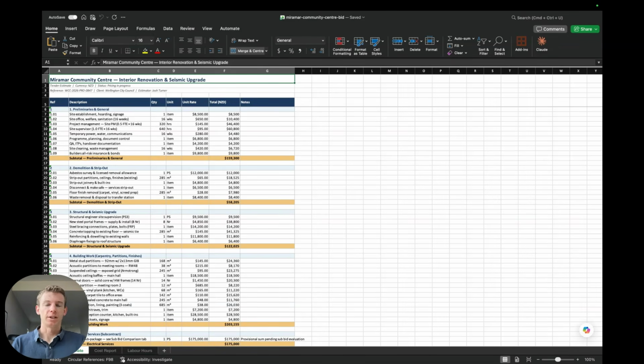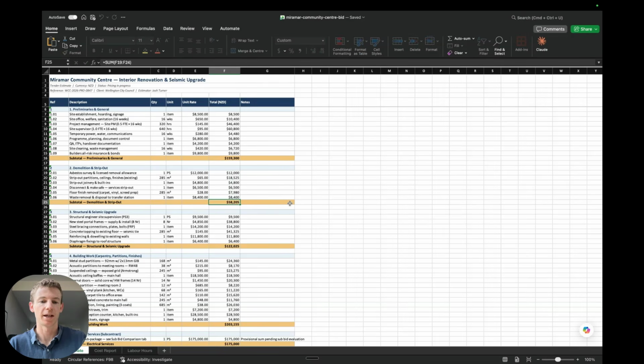And the first thing I want to share is how you can use Claude to essentially debug your worksheet. So here I've got some example data for what could be a potential estimate. And you can see these formulas as you would expect in any sort of quantity unit rate setup. But here, this is hard-coded, and that's obviously not going to update for when things change and could produce some errors. And you see down here, it's just the sum. So it's exactly what you would expect. And that would be a problem down the track.